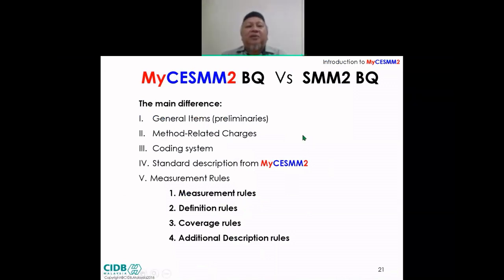Okay, now let us compare Mycesmm2 with SMM2. I have no opportunity to check Mycesmm in detail, so I'm still using SMM2, which is the previous standard method of measurement for building works, year 2000. So the main difference is general items. In SMM2, they call it preliminaries. Then we have this one item called method-related charges. This is unique to our Mycesmm2. Building SMM does not have method-related charges.